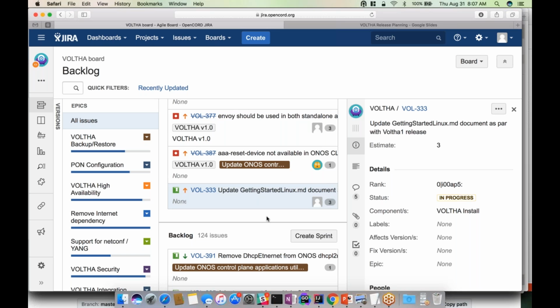So Amit and I talked about that a while ago, and we were wondering if we did adapt status in IGMP, if we were actually going to get redundant configuration data, because we would also have to back out the data from the device, the OLT application, right? It'd be duplicate data. And when we looked at that, we said that's probably something we don't want to do. We're not going to have time for this sprint, because we have to resolve where the actual authoritative data is going to be. And so I think we just decided it doesn't make sense. Leave the data where it is now, because it's well known, and then we have to decide how to move that out with a little more thought.